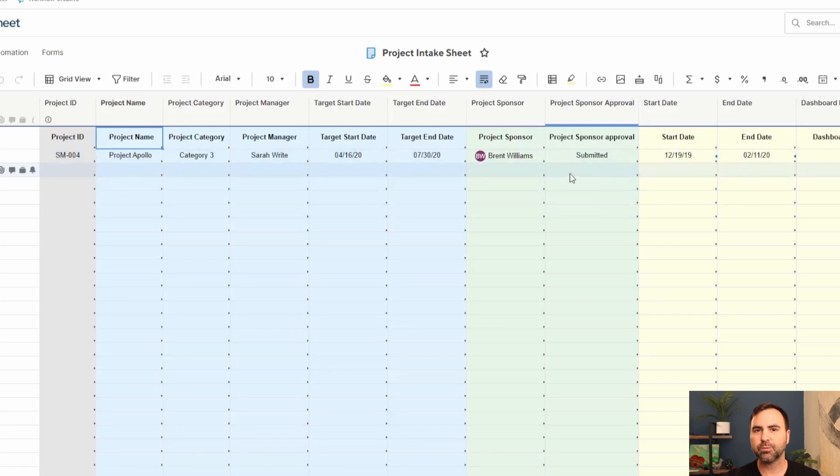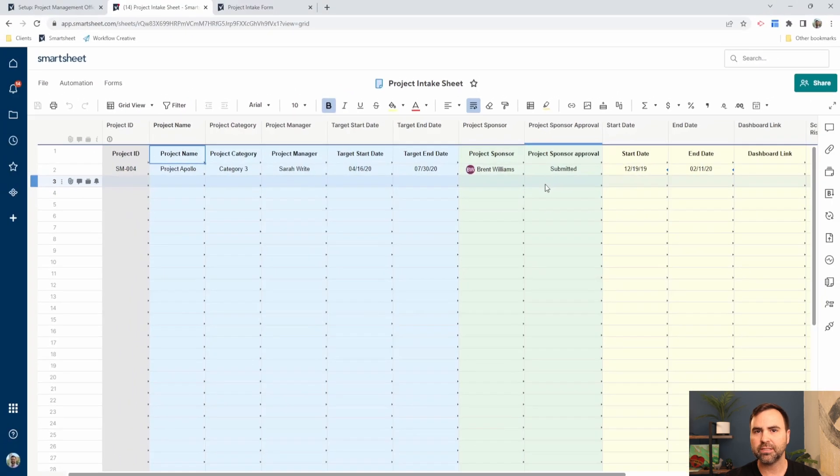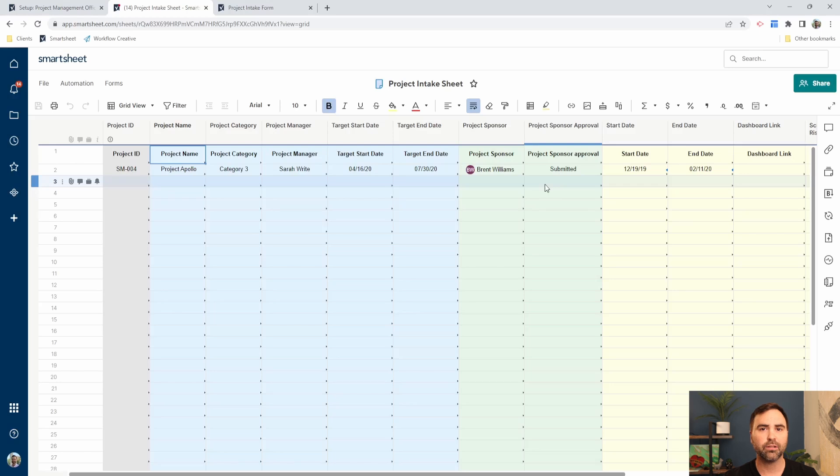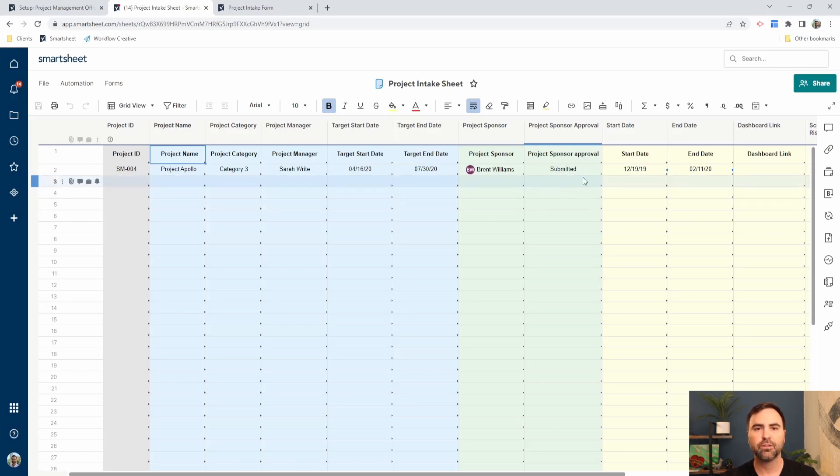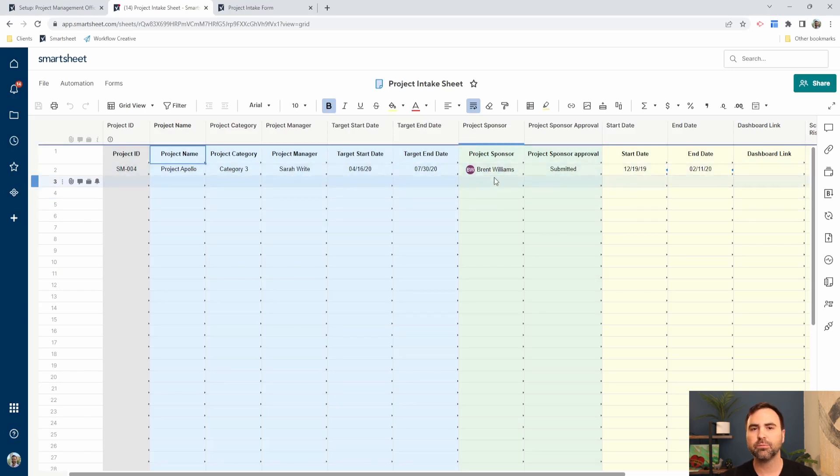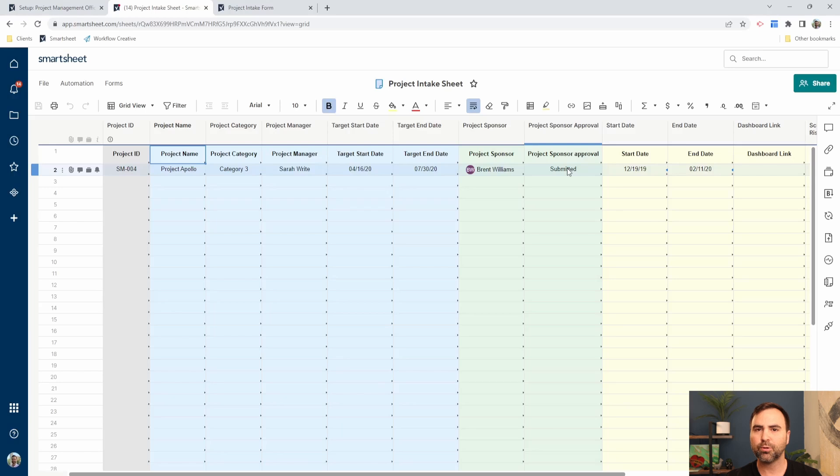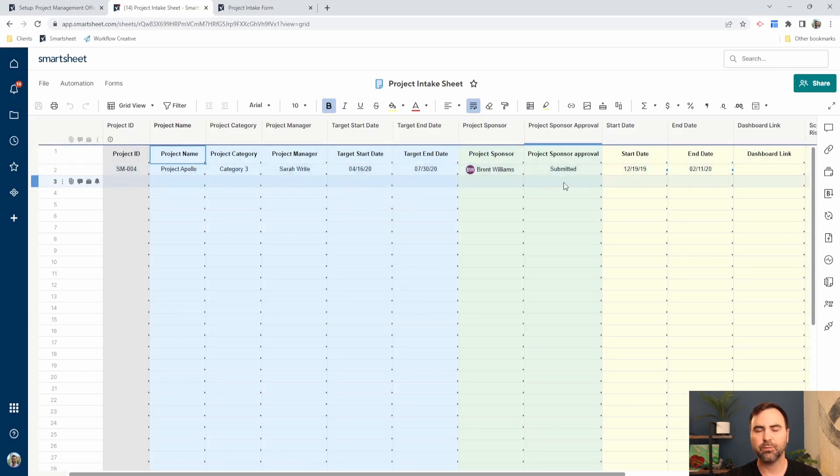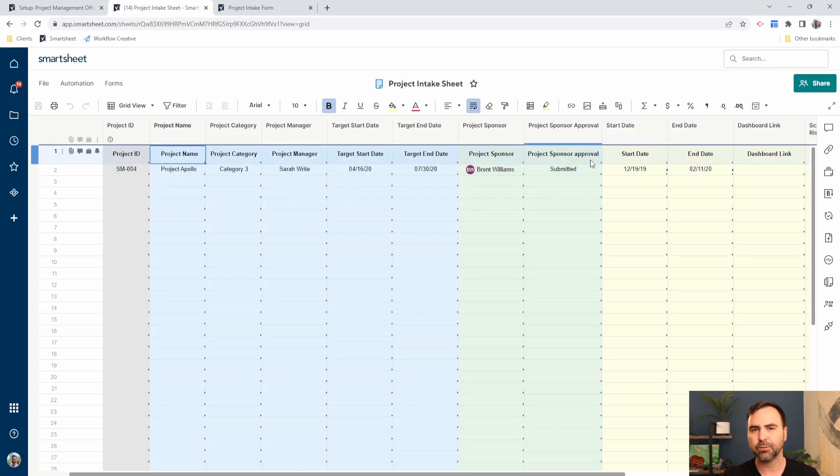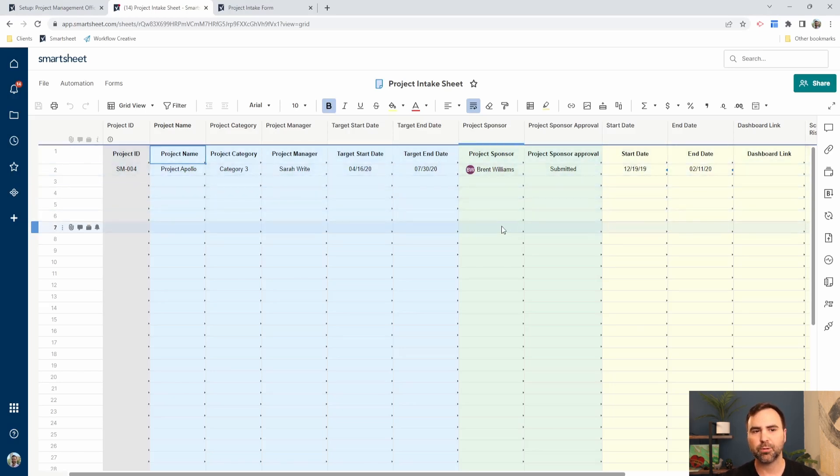One of the things we should talk about in sheets is workflows and automations. We can kick off automated alerts, approval requests, or update requests from our sheets that get sent to an end user's email. In this case, Brent Williams is going to receive a request to either approve or deny this project request. Once approved, we can send off another automated alert to let the project manager know that their project was approved. Those are just some examples of automations and workflows that we can use in Smartsheet.